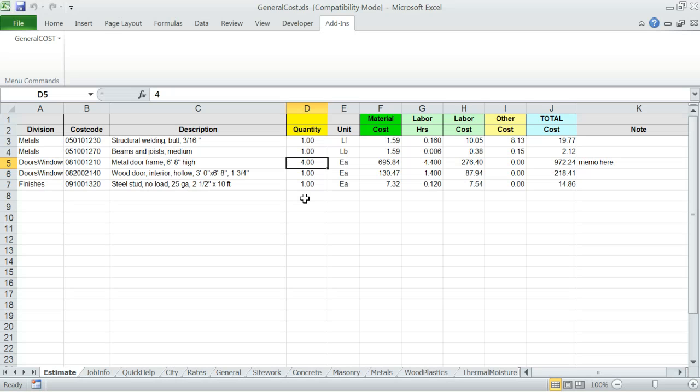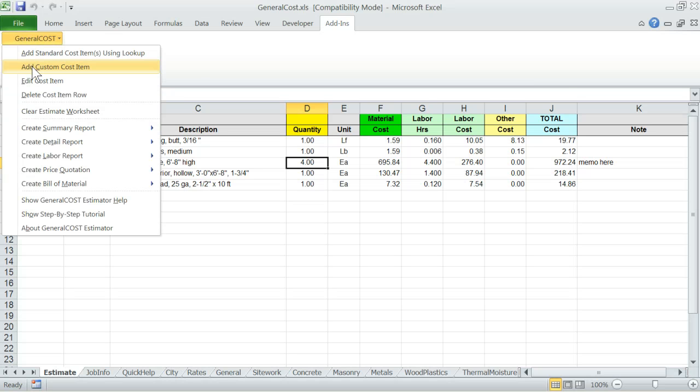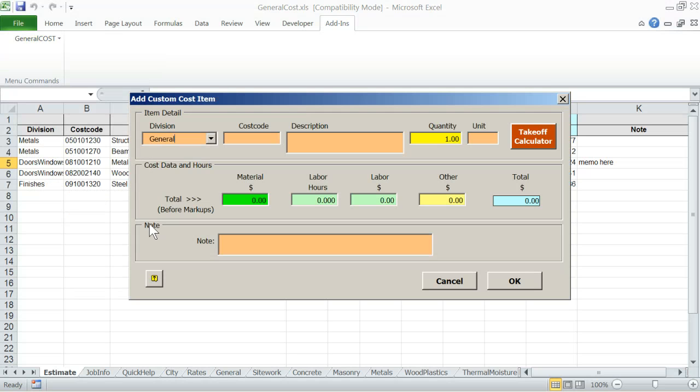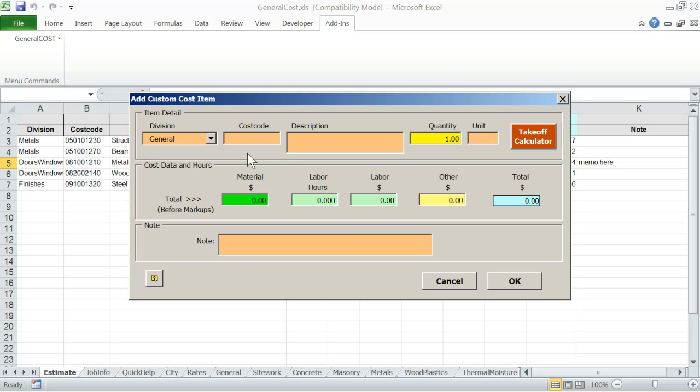At any time, you can repeatedly go back to adding items using Lookup and export more items from your data list right into your estimate. If you have a unique custom cost item that does not exist in the data list, you can use the add custom cost item from the general cost menu. This will open the same window, only the data fields will be blank. It is now up to you to define the custom cost item for that particular estimate. When you click OK, it will also be transferred to the estimate worksheet.